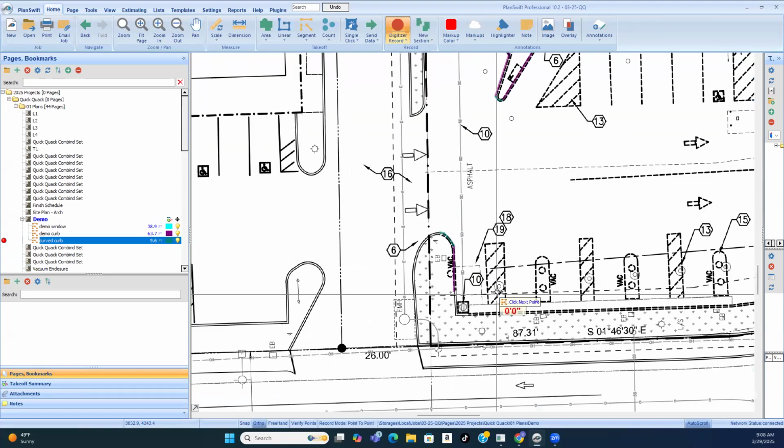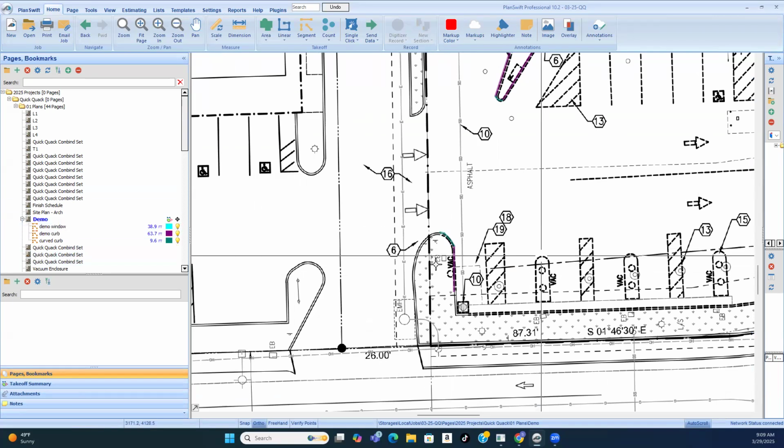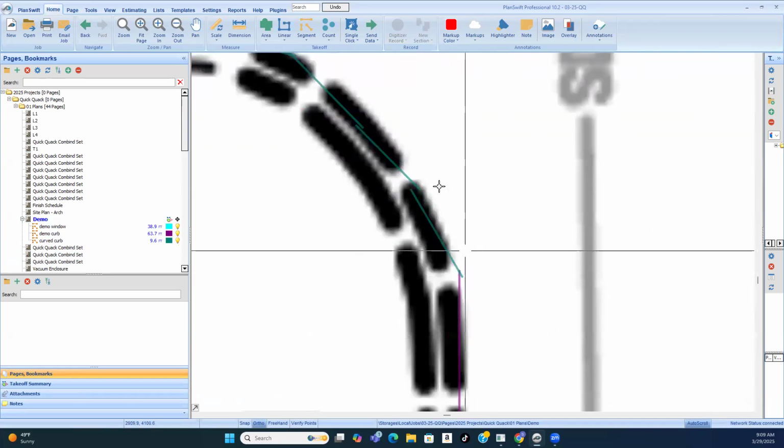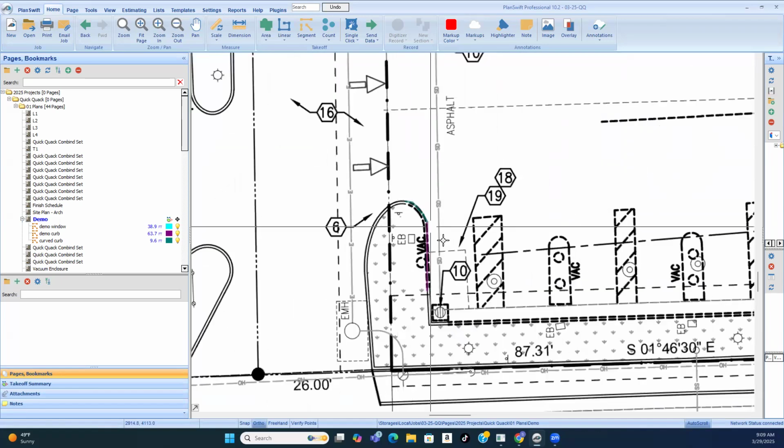But did you tell the software that I'm trying to do something that's more rounded versus straight, or does that not matter? No, no. You see, it's all little straight cuts, but you don't care, because when you interpret that in your estimating, the man-hour unit is more for a curve as opposed to straight. So it doesn't matter on the display if it's perfectly curving. Okay, okay.